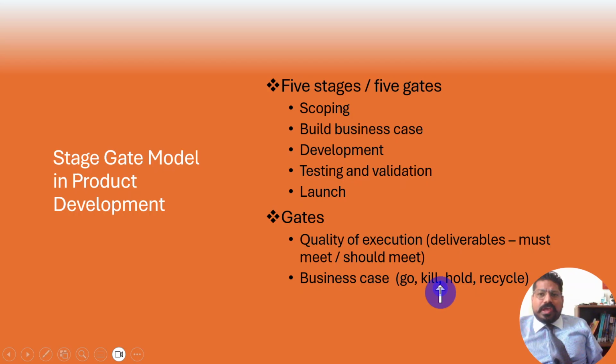The business case is not viable now. When we started the project, yes, it was. Now it is not worth doing. You kill it. You hold it if you think that the need will come up again after some time. For example, during the pandemic, most of the projects were on hold because the finances, the requirements, everything was jeopardized.